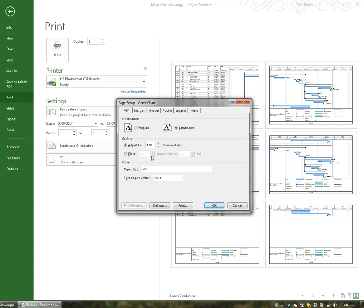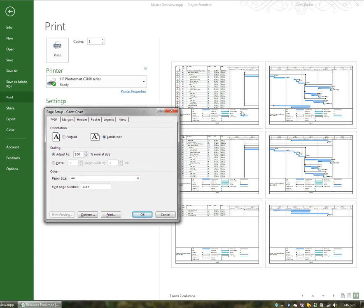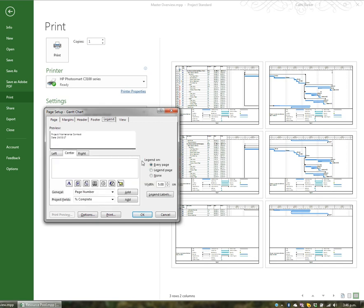Before I do that, I want to tackle the legend first. I can see at the bottom of the first, second, third, fourth, fifth and sixth pages there's a legend that takes up a substantial — almost a quarter — of the height of the page. So I'm going to choose legend at the top and choose none. You can either choose none or print a separate legend page, but I don't think it's necessary to put the legend at the bottom of every page.